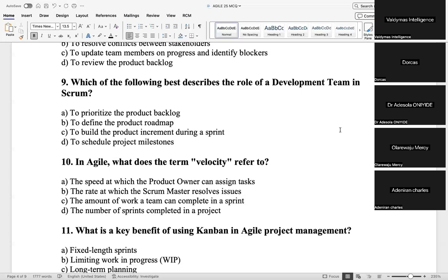So it's just an arbitrary estimation of the amount of effort that will be required to build that story. So if it's just a simple story like regression testing of the story, it might just be 1 point. But if you would have to do a configuration change before you do regression testing, that means there will be code changes. Then that might be like 3 points or 5 points, depending on the amount of code change.